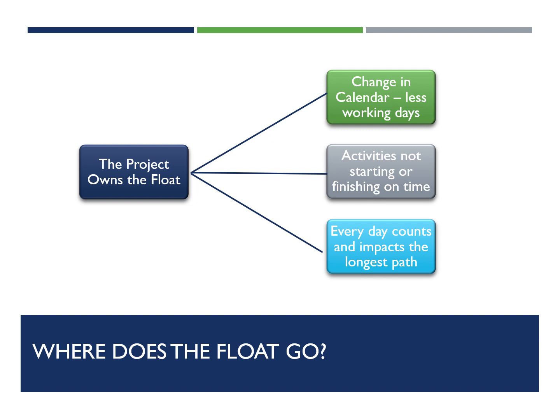But where does it go? If we're manipulating calendars, like weather calendars, let's say we've already built up our project and we found we forgot to incorporate a bunch of weather delays, and so we change our calendar to show the potential weather impacts, and there goes all the float. It's because we've turned those days that were supposed to be productive into not productive days, and that's what ate up all the float.